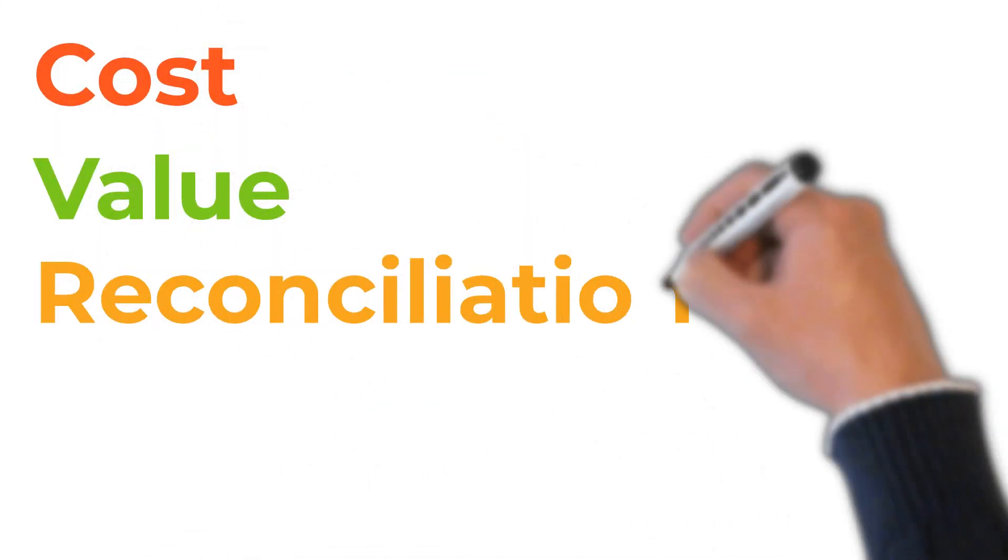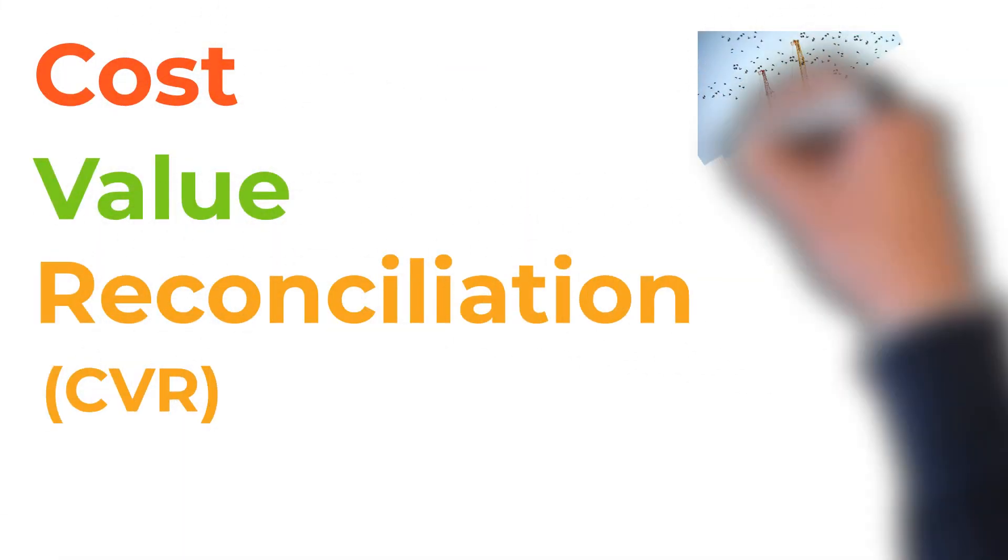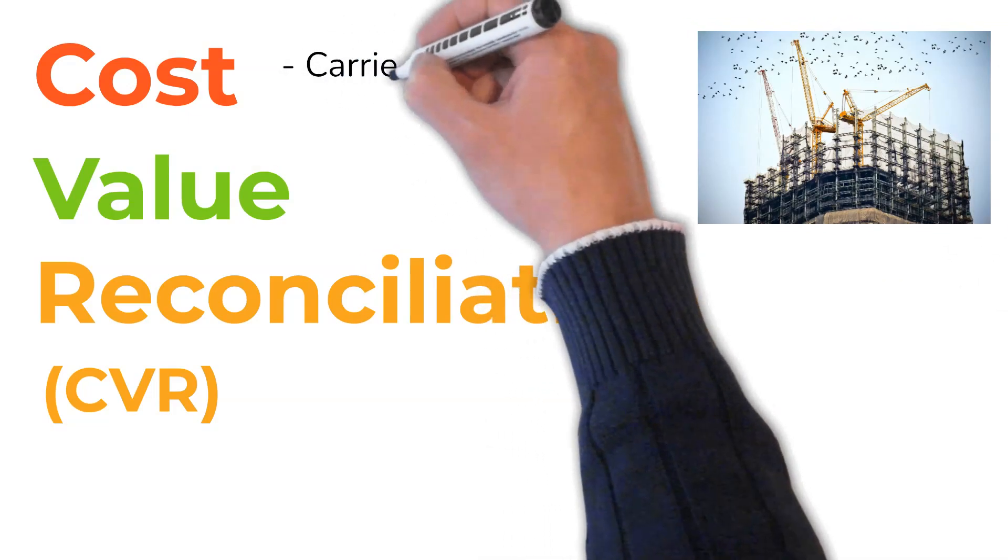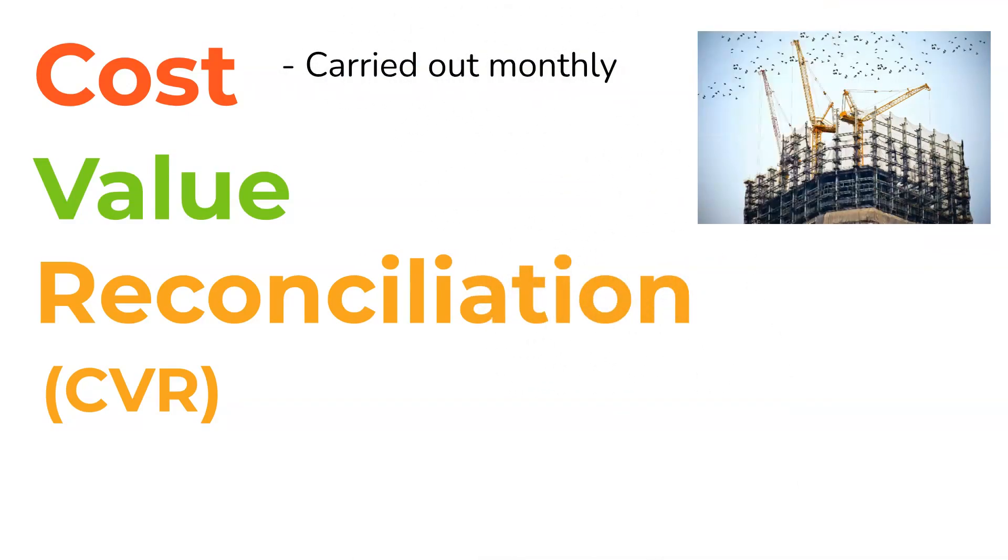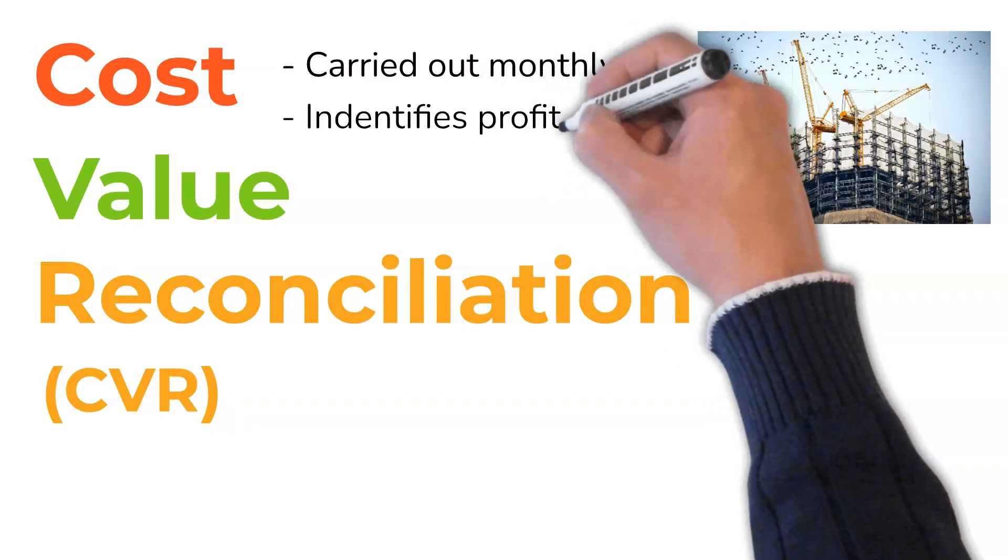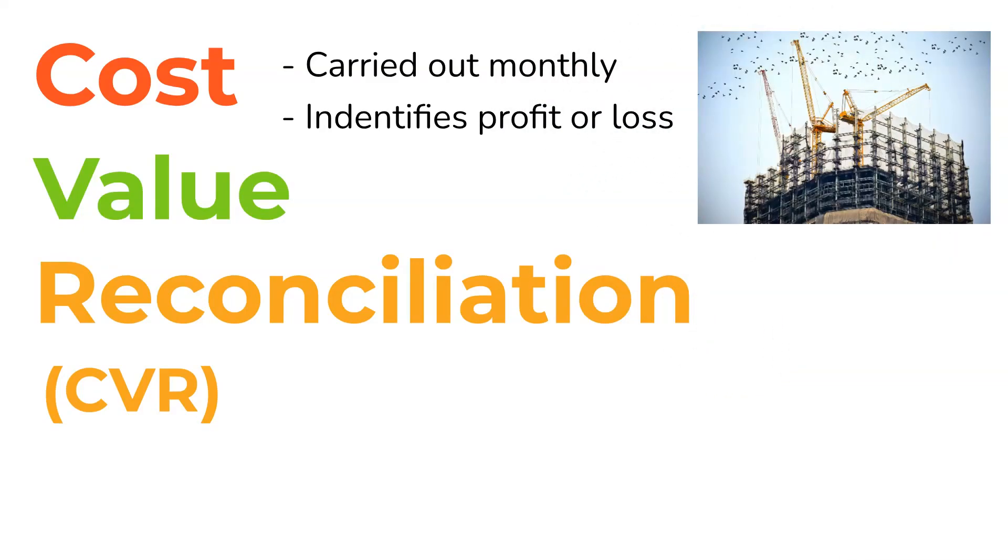Cost value reconciliation, or CVR for short, is a tool used during a construction project. Typically carried out once a month, this task fulfills the purpose of determining the profitability of a project throughout its life cycle.